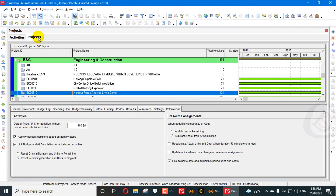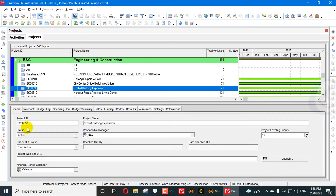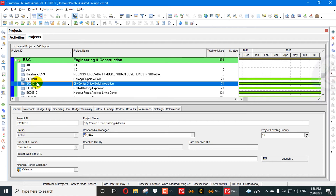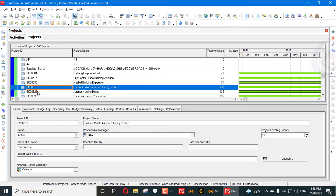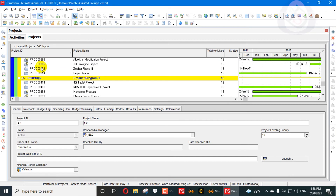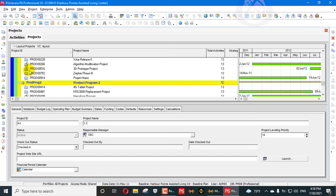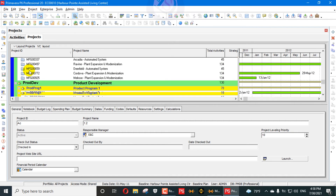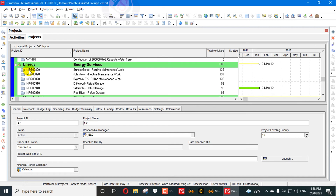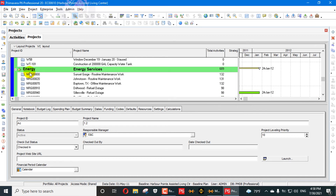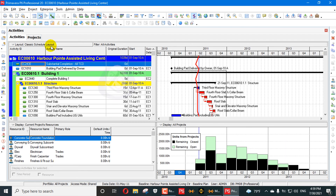What-if projects are projects with a status of 'what-if,' indicated by a question mark. These are virtual projects and are not considered real projects. Because they are virtual, they are not counted as having any resources. If a project has a what-if status, it will be excluded when you synchronize your resource usage profile.